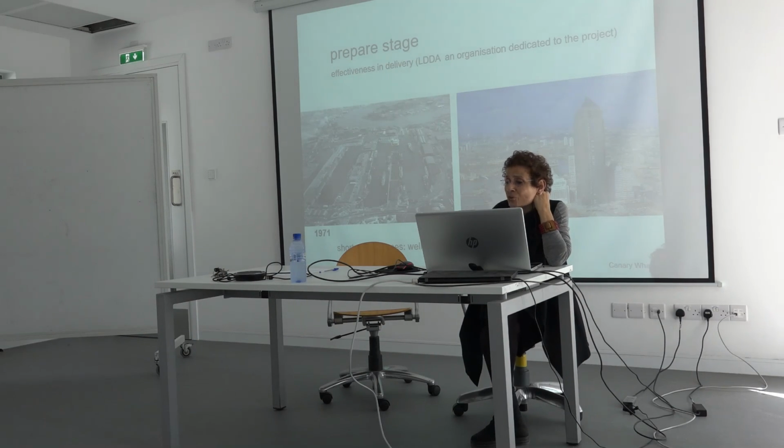An example here, you know Old Canary Wharf, I'm sure, in London. Look at the time frames. Battersea Park, it took 40 years to deliver the first stage. This project, equally complex and equally difficult, it took 20. So 20 years shorter, simply because an organization was set up, the London Docklands Development Agency, to oversee this project. So it wasn't delivered by the local authority like Battersea, it was delivered by a public company, which actually took care of all of the things that I mentioned before.